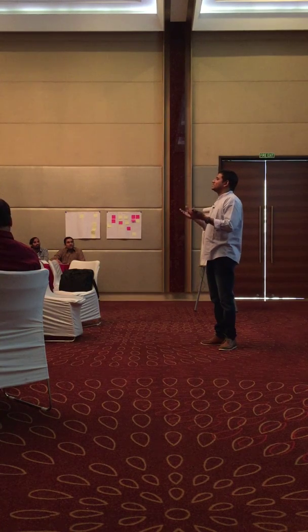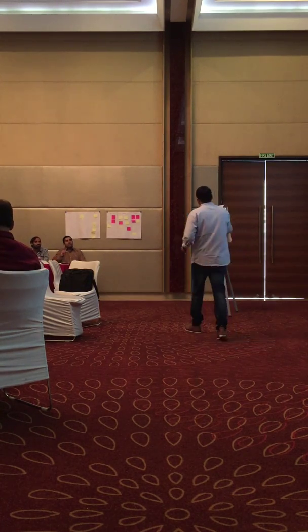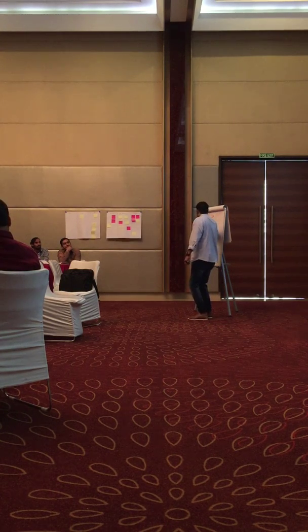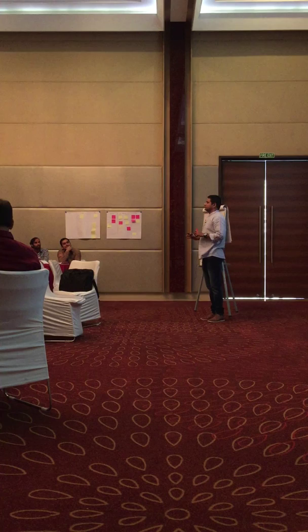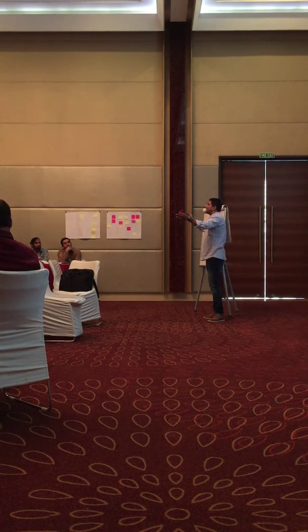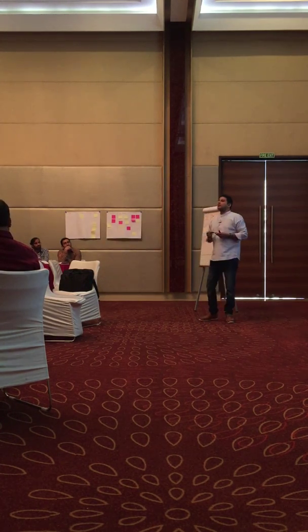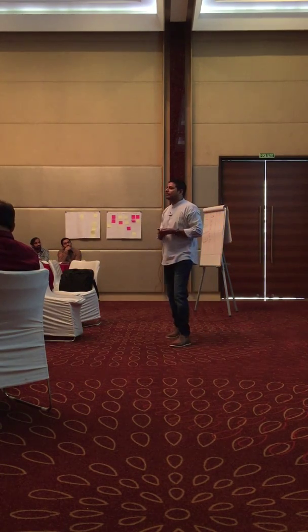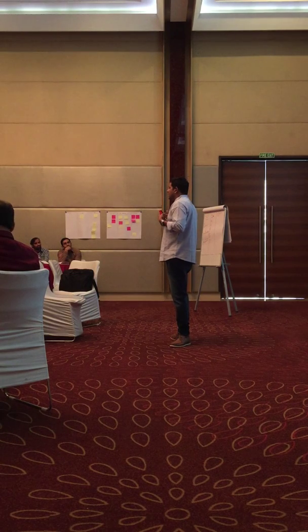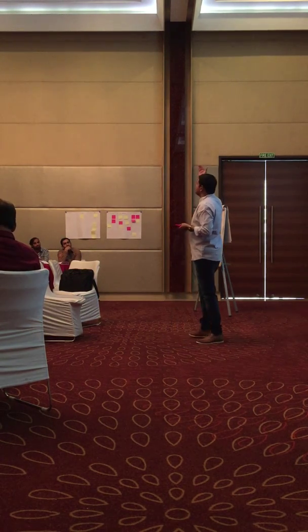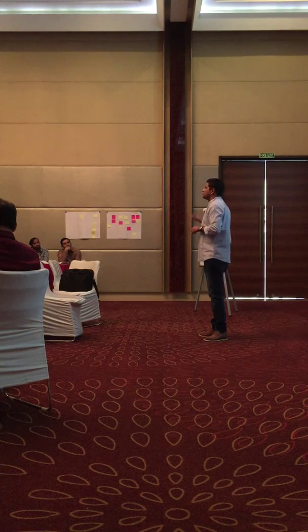So to be more precise, concise, small, that should lead to the conversation. This should not give the entire details of the story. Conversation between the development team and product owner, or product owner and stakeholders, whoever it may be, players of the product development. That should drive to identify the confirmation, that means the acceptance criteria. What is the criteria that you tell me to accept the story when it is converted into working software at the end of the sprint? So he tells you, if you satisfy all these 5 conditions, then I accept the story, right? So that is the 3C concept.